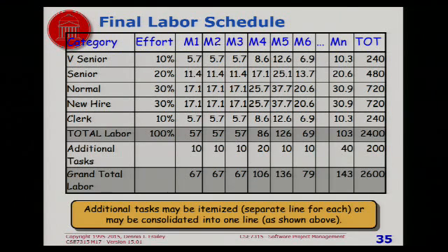If they change these numbers, and we're going to see this next time, you have to recalculate your estimate based on the fact that you don't have as many experienced people and therefore your productivity is lower. And that's going to mean your numbers get higher and it's actually going to cost you more.